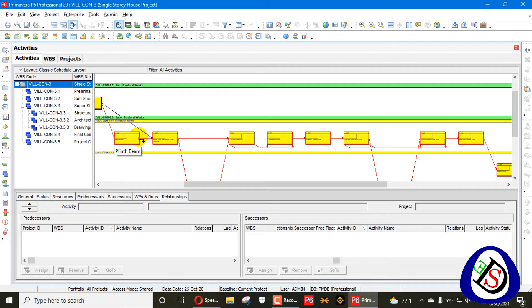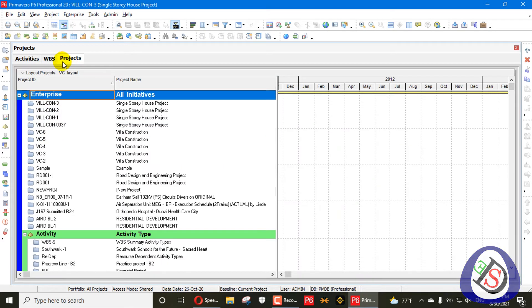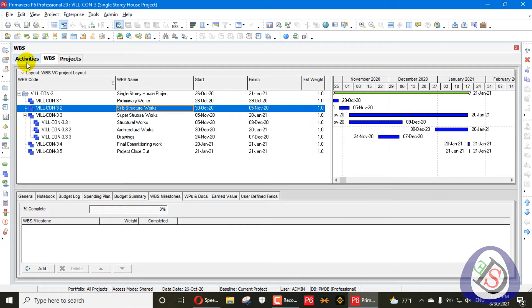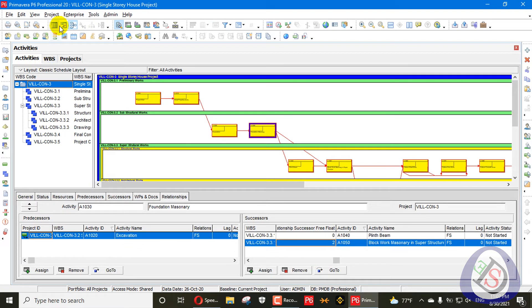A relationship is considered redundant when one of the activity's successors has the same relationship with a lesser relationship free float. So if your project has 1,000 or 2,000 activities, how will you find out your redundant relationships across the complete project? I will show you an Excel trick that is very fast — you can find them easily.